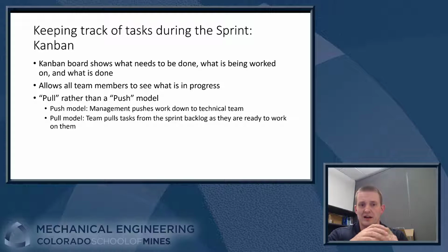All right. So the cool thing about this, we call it Kanban, is a pull rather than a push method of project management. So a push method means that you have some managers that are looking at the state of the project and they figure out tasks that need to be completed, and then they push those tasks down to the technical team and tell them to complete their work, right? And then follow up later on to see if the work is getting done. Kanban is, of course, the opposite of that.